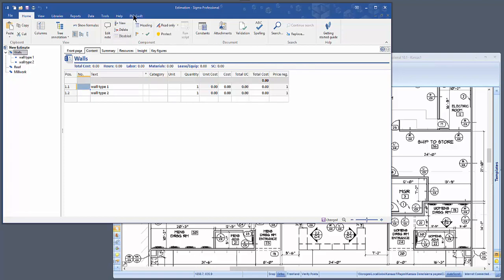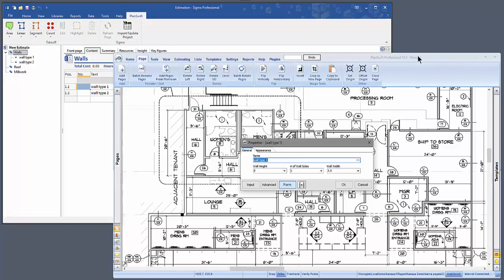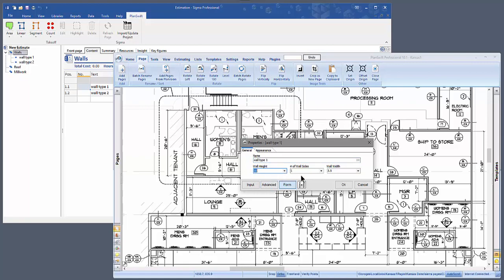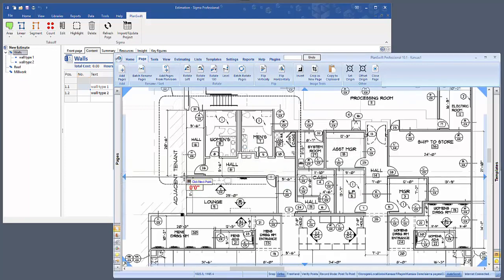Click on Wall Type 1, click on the PlanSwift tab, click on Wall Area, and go to PlanSwift. You'll see that a box is open where you can establish the wall height. Let's call it 10 feet. Let's say you want drywall on both sides and the wall is three and a half inches wide. Click OK and start your takeoff.